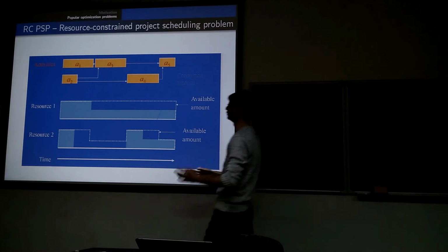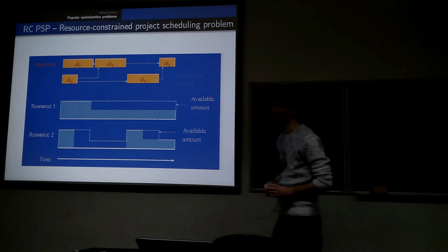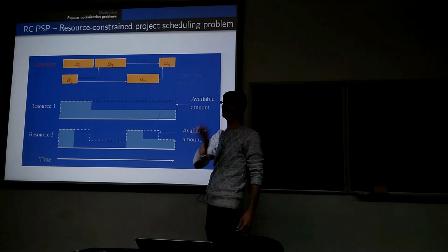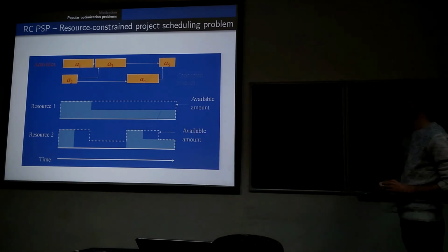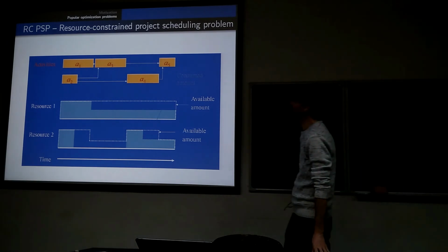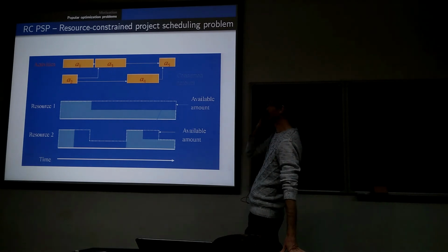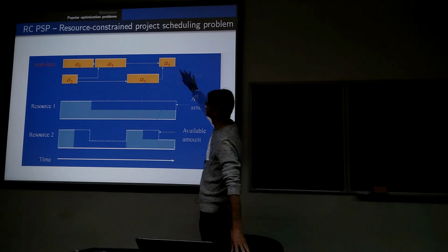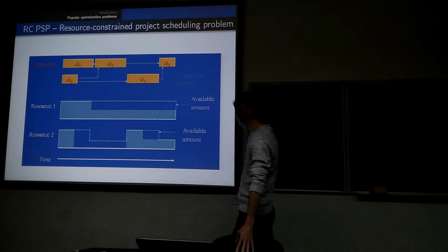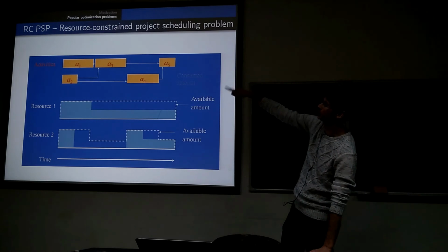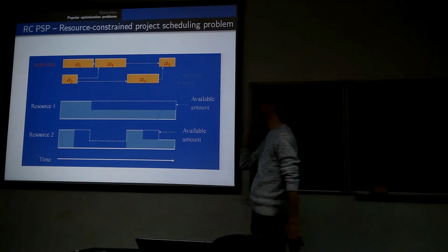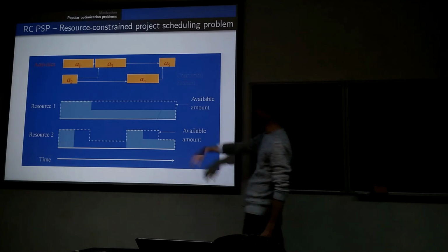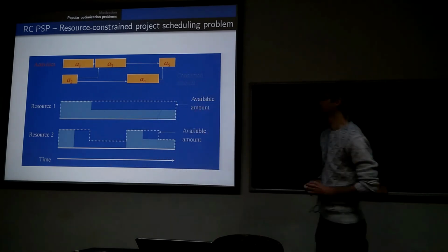This is usually like a default criterion of optimization, but of course you could also always consider cost. So maybe you want to have the shortest and the cheapest and maybe also quality, because we know from building motorways in Poland that the cheapest and the shortest is not necessarily acceptable after a few years, for example, when the quality was very low. So this is what I mentioned. This is like a project scheduling problem, but the first part of this title says resource constraint. And resource constraint means that you don't have a complete freedom of where to start and when to stop each activity, because each activity requires some resources to work or to do.